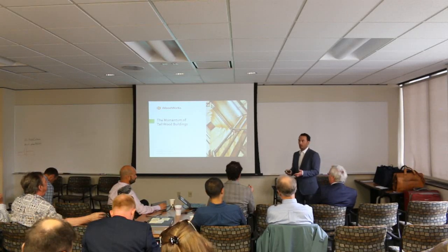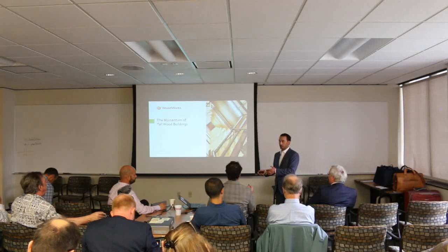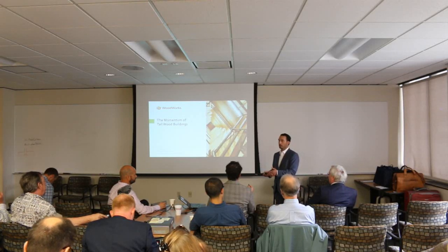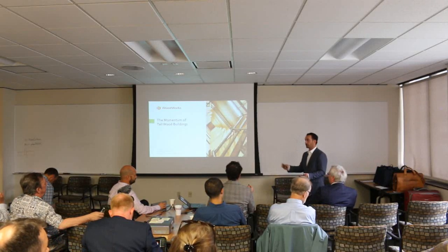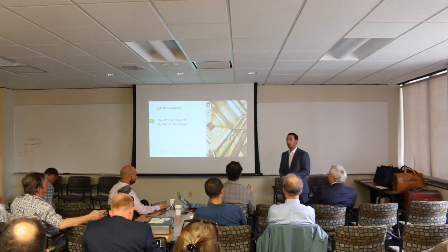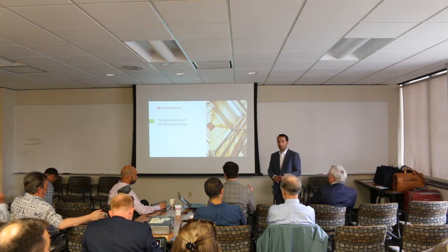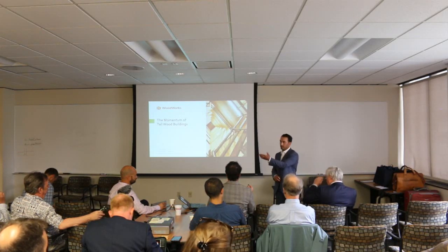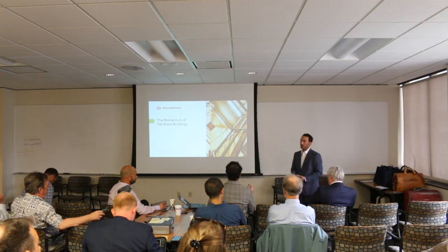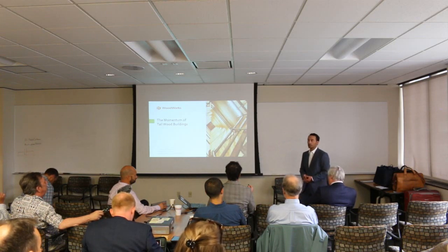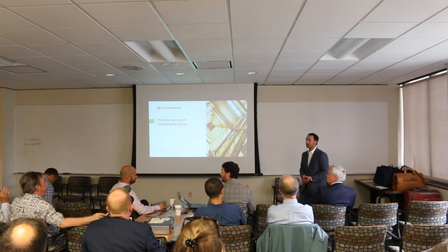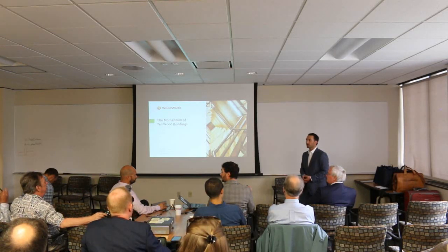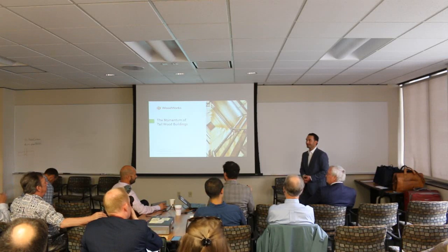Yeah, it's a little more, I think, than some of those materials if you're just talking the bare structure. But if you're thinking about how it all goes together, can you do it with less people? For stick frame, you don't have to have a whole framing crew. Can you put it together with just a couple of guys? So there are other costs to consider, but as far as your question of tilt-up versus concrete, it's probably a little bit more expensive. And that's finished, that's insulated. Yeah, on the CLT. Finished to finished. Yeah.